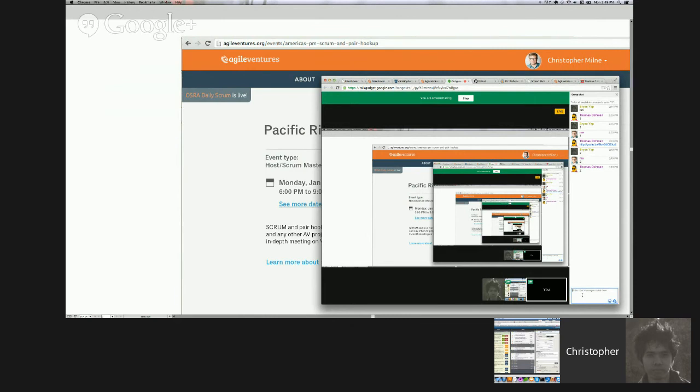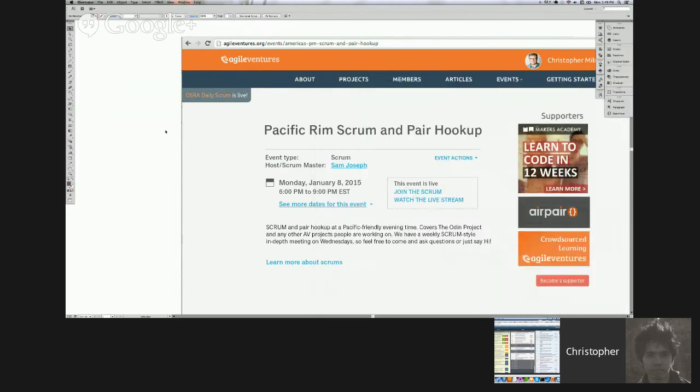Who are we talking to? No, anybody of you guys. Brian, why did you set 2 on this one? Well, it's mostly a UI change. We have all the information we need. So I think it's just a 2 dealing with the HTML. It would be a 1 for me, except there's a little bit of messing around with JavaScript. And there are some tests that need to be refactored also. That's why I set that 2. And the jQuery things and stuff. All right.